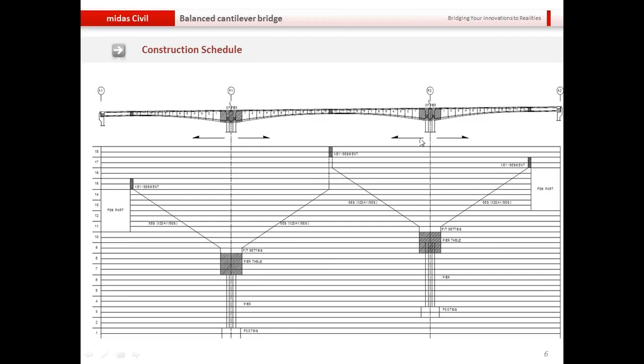And this is how a construction schedule usually looks like. You can see on the y-axis there are numbers. Each segment represents, or each line or division represents 15-day timeline here. So you can see that the pier table has 1, 2, 3, 4. It means it is 60 days the total construction time for the pier table, or the curing time.